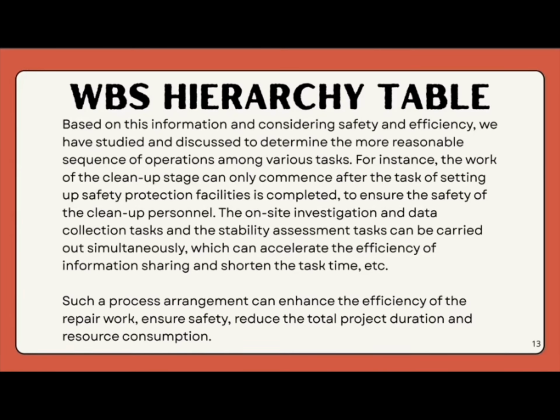To ensure the safety of the cleanup personnel, the on-site investigation and data collection tasks and the stability assessment tasks can be carried out simultaneously, which can accelerate information sharing and shorten the task time. Such a process arrangement can enhance the efficiency of the rapid work, ensure safety, and reduce the total project duration and resource consumption.